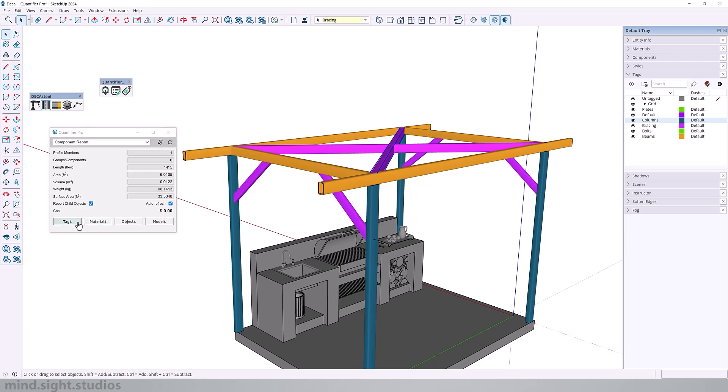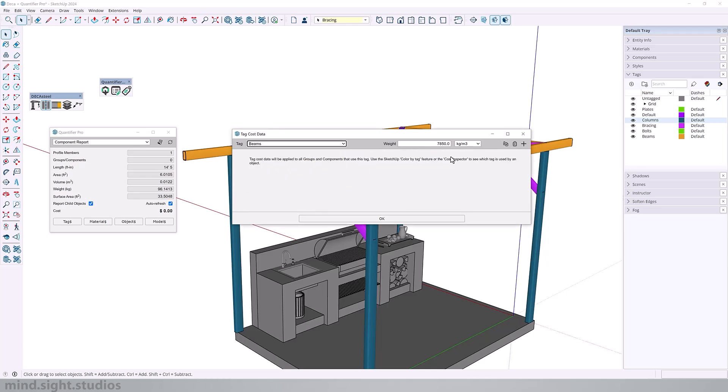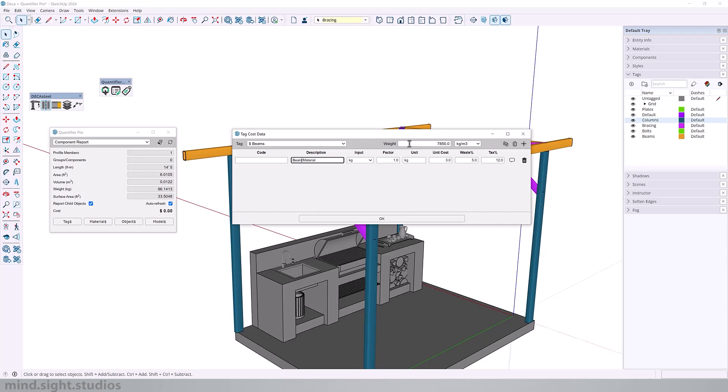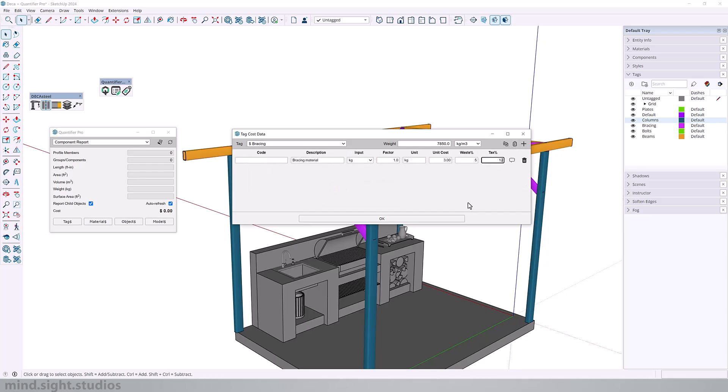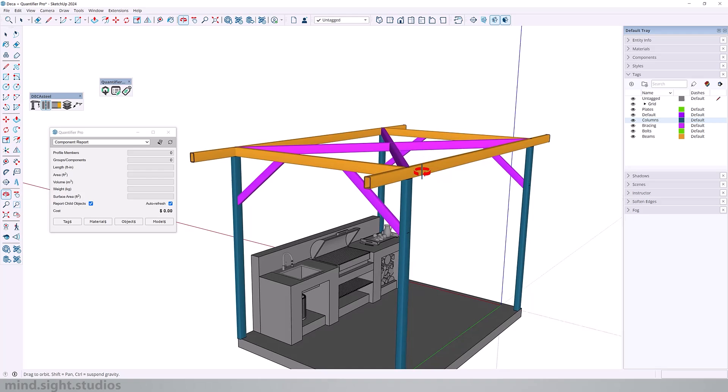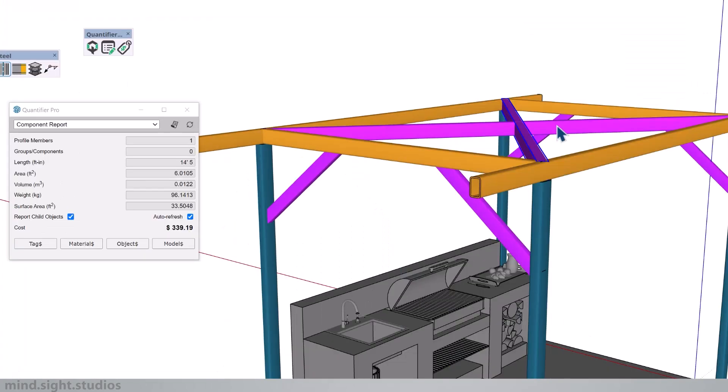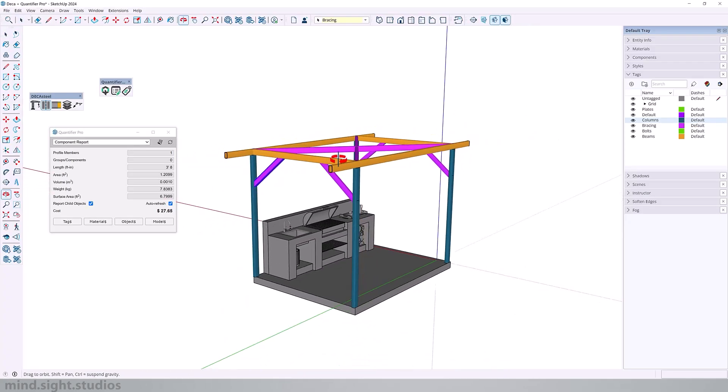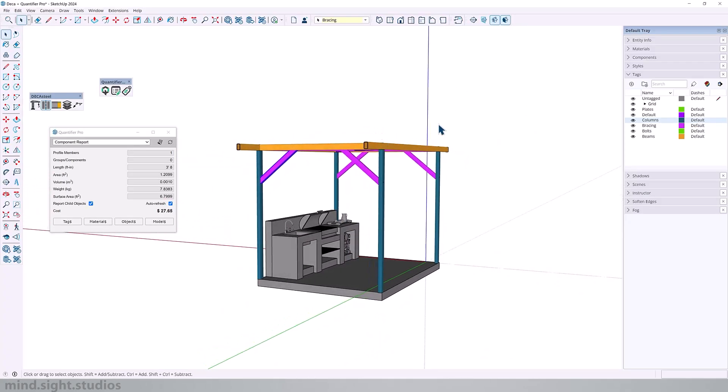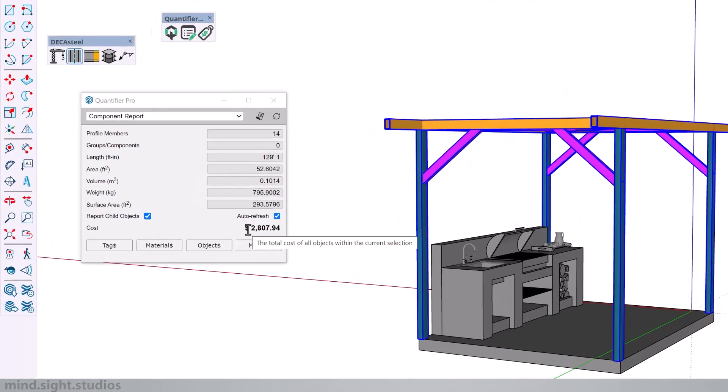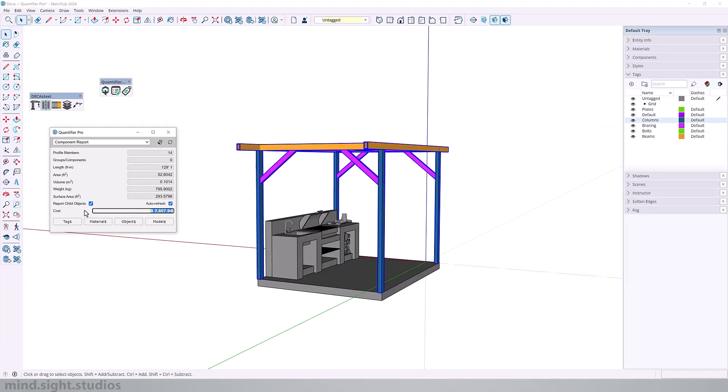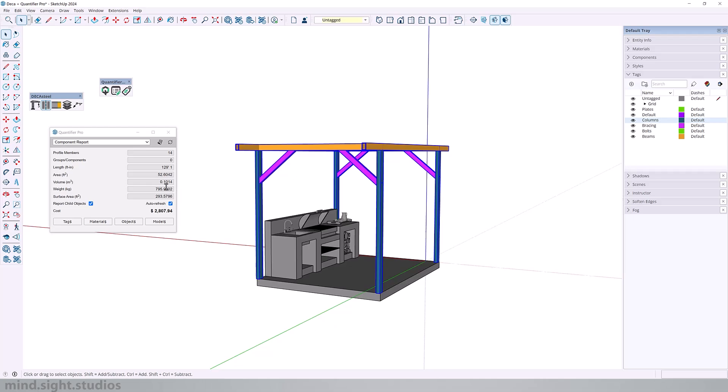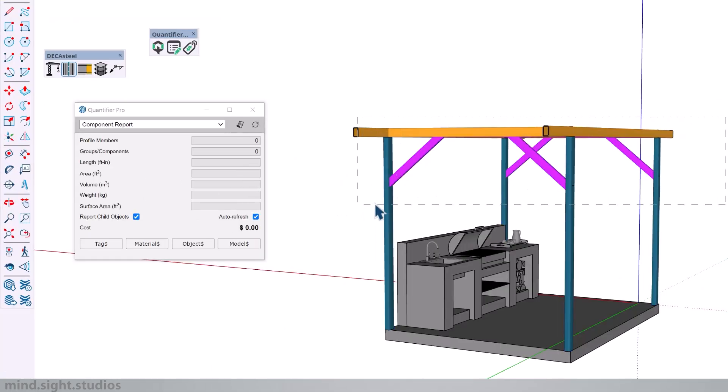So we'll go back to the tag. And because everything is steel, we're going to copy this entire data. So we can copy this to clipboard. We'll go to the beams, for example, and we'll paste it here. Same values, nothing much to change. I'm going to hit OK. We'll do the same for the bracing. So now that we've updated each of those tags, we can now select and see the price for each item. And if we wanted to get the price for the entire steel structure, all you have to do is select. And because all the data is already incorporated, we can see that this could cost around $2,800. We actually also have the weight of the entire structure, which is around 796 kilograms.